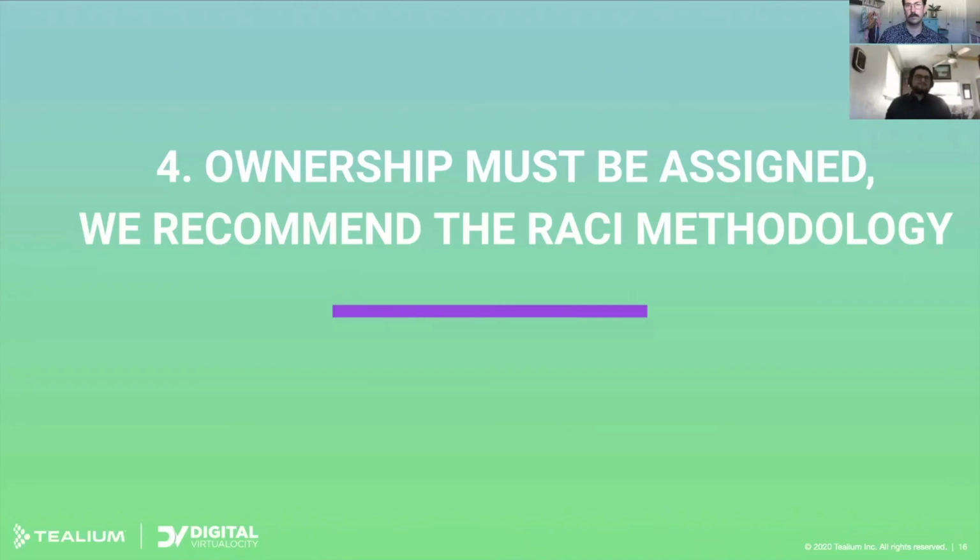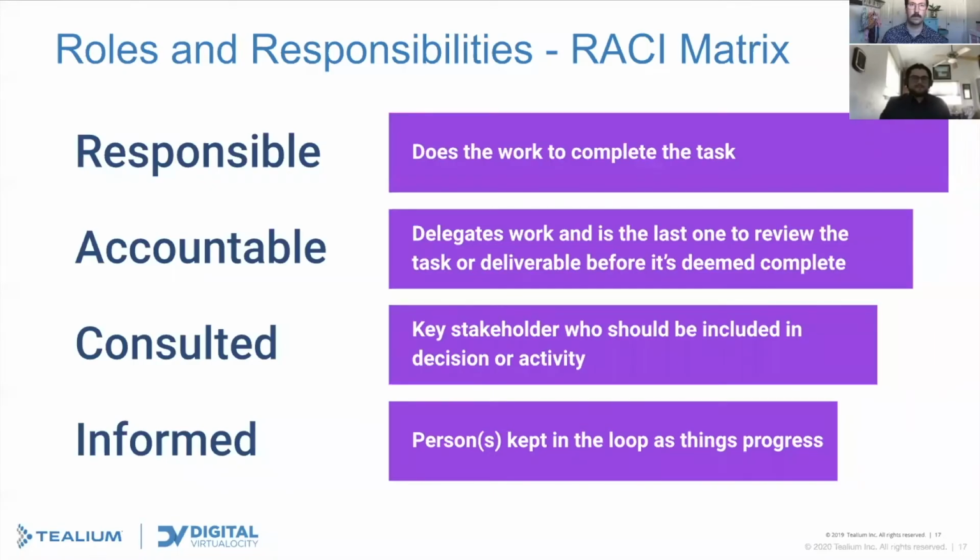So I can't stress enough, I mentioned it in the previous slide, that individuals have to be identified as responsible for tasks to execute upon. We feel that in order to do this, and we use this internally, we guide our customers to use this, is the RACI methodology. It's one that we really embraced and we recommend to all of our customers so that people understand their role and what they're going to do. If you're not familiar with RACI, it really is simplistic. It's those who are responsible, those who are accountable, those who should be consulted, and those who should be informed. Those that are responsible and accountable should just be individuals.